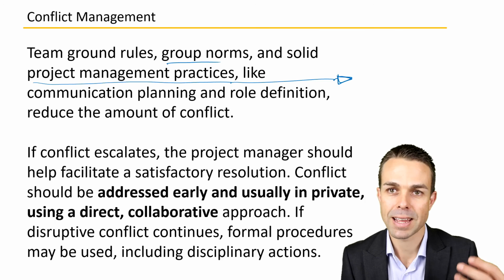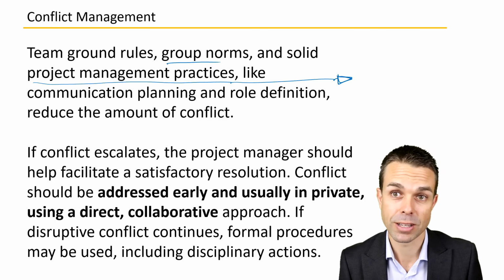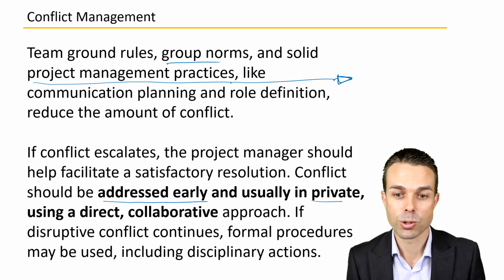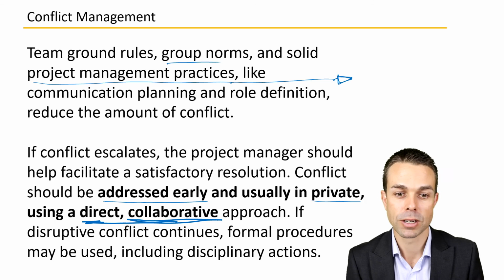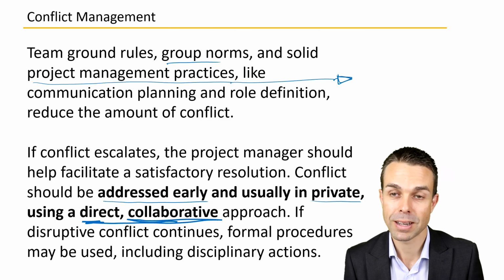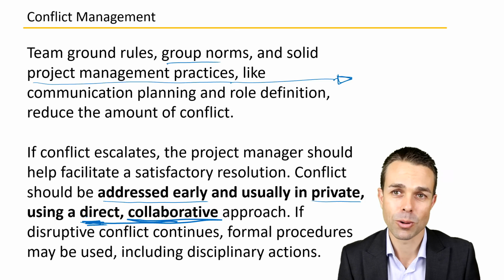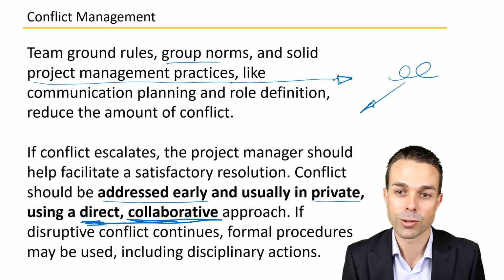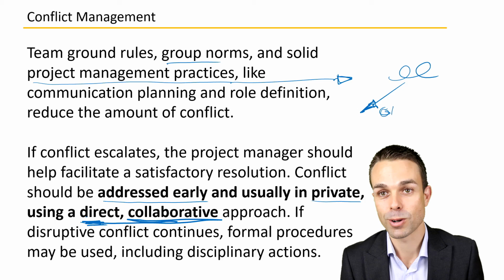Now, if the conflict escalates, one thing that you may come across in the PMP exam and definitely in your project management career, conflict should be addressed early and usually in private using a direct and collaborative approach. So again, problem solving here, trying for that win-win, collaborating with the other party, but using a direct approach. So we're not hinting or going around in circles. We need to go directly to what the source of the problem is, go there and use a collaborative approach. And that is the approach recommended by the PMBOK guide.